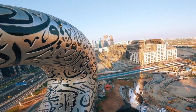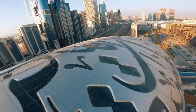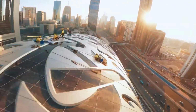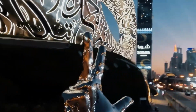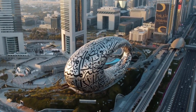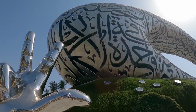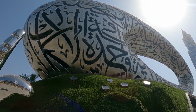The museum's facade is about 60 to 70% complete. The small construction crew conceals the intricate engineering required to create each panel. No two fiberglass panels are alike due to the building's shape and calligraphy cutouts. Before the stainless steel finish and glazing, each of the 1,024 panels must be separately molded and fabricated. It's a labor-intensive procedure, and just 6 panels may be made every day.